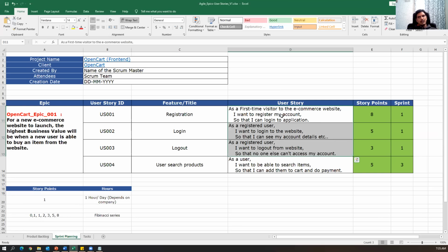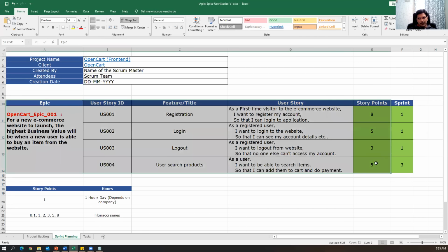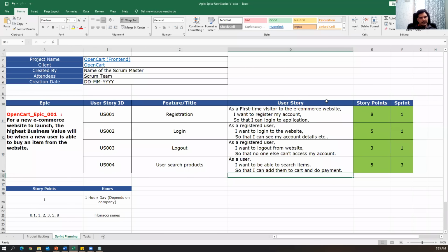All these things should happen within the particular sprint. So accordingly we have to give the story points, and accordingly we have to choose the stories or plan the stories for that particular sprint. Very, very important. And this should happen during the sprint planning meeting.